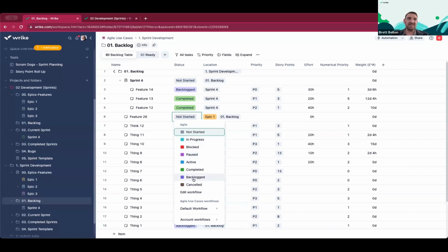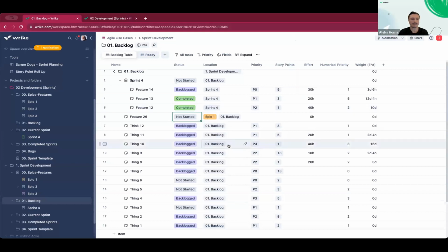And again, backlog down here really doesn't need to be called backlog since we have a backlog folder. This is more just something that differentiates between the work that hasn't started but is ready to be started and the stuff that we're likely not getting to anytime soon and that you maybe don't want showing up on your report as an active status, or to be able to just not send notifications about, et cetera. There's a few examples of benefits from things that are not in an active status, such as backlog down here being under completed.